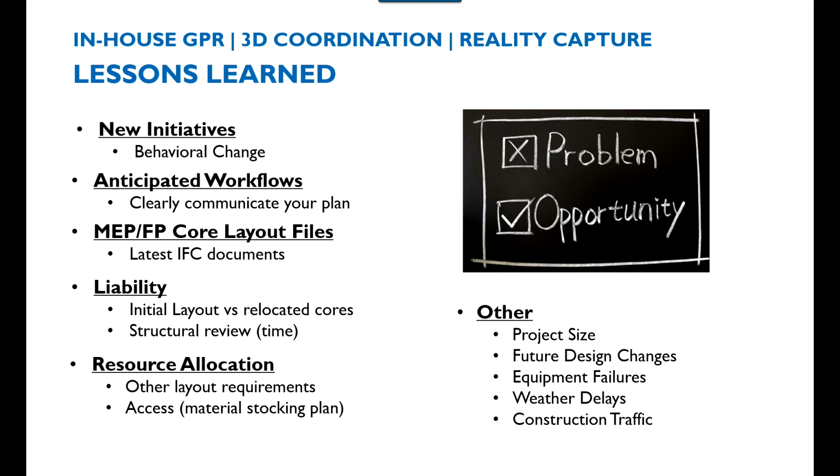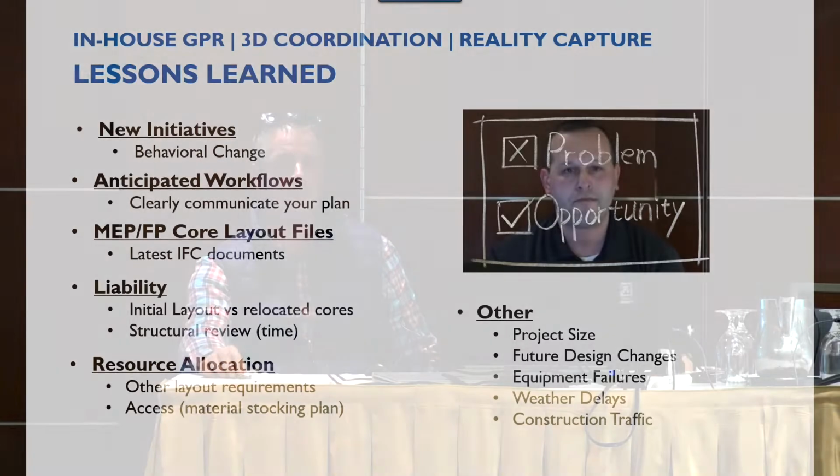Who captures those? Equipment failures, we've had them. The GPR unit broke down. We lost almost a week. So having a plan of action when that happens: who do you call? How quickly can we get it? Do we buy another unit?